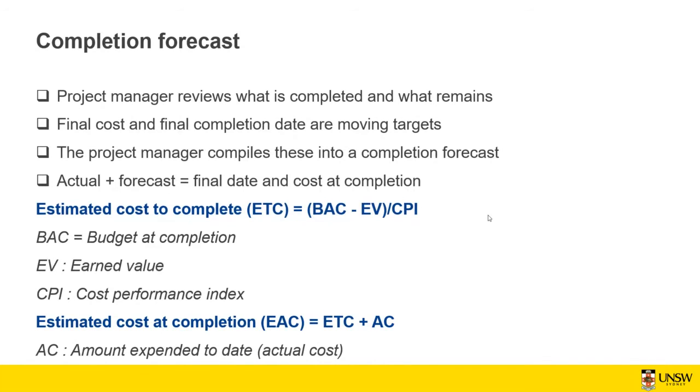But as a project manager, you need to forecast how it's going to be from now on based on the prior performance. So based on these tools and the rate at which things have been completed, you can forecast how things are going to work out in the future. This is based on the prior performance. If something changes in the future, for example if you add more resources to the job or do some crashing or fast tracking, then perhaps these forecasts are not suitable.